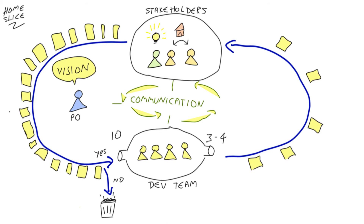That way, Malik can be supported in his role and doesn't have to always get into the details, allowing him to look at the big picture. The role of the product owner, at the most basic level, is to maximize the value of the product by focusing the work of the Scrum development team in the right areas. He does this by prioritizing user stories with the most important stories on top and less important stories at the bottom, so the team can pick up stories from the top of the backlog to work on.